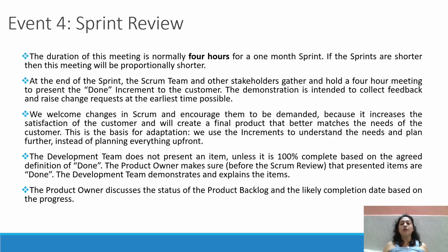Okay. So the demonstration is intended to collect the feedback and raise the change requests at the earliest time possible. We welcome changes in Scrum and encourage them to be demanded because it increases the satisfaction of the customer and will create a final product that better matches the needs of the customer. So this is the basis of the adaptation. We use the increments to understand the needs and plan further instead of planning everything upfront. Correct. So whatever we discuss and they think should be included in the sprint, we will take that immediately in the next sprint.